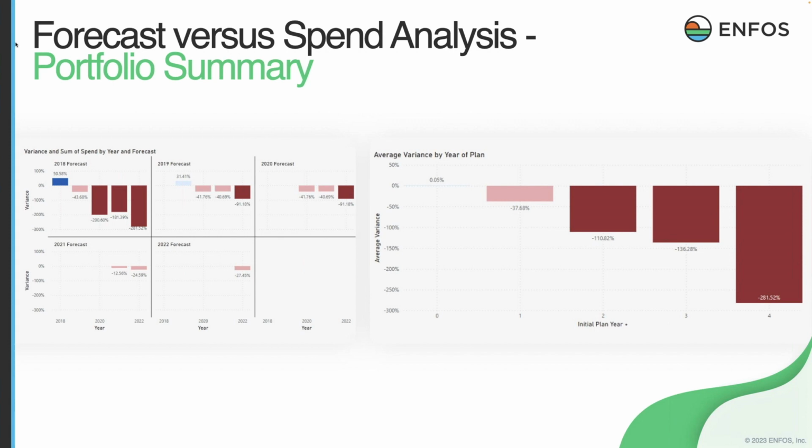This goes back into play on the uncertainties around remediation projects. Now, there are some other factors in there as well, such as policy and accounting and work commitment procedures. But you can see that in current year plus 1, over that 5-year horizon, the average variance was negative 38%. And from there, it gets worse, right? So current year plus 2, you're already talking minus 110%.